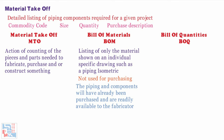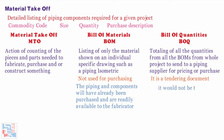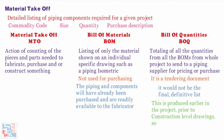Piping bill of quantities (BOQ), also called material summary, is the totaling of all quantities from all the BOMs across the whole project, sent to a piping supplier for pricing or purchase. The piping BOQ is a tendering document covering the scope of materials for the entire piping component of the project, but it would not be the final definitive list. It is produced earlier in the project, prior to construction-level drawings, so it would not have the definition that the MTO gives.